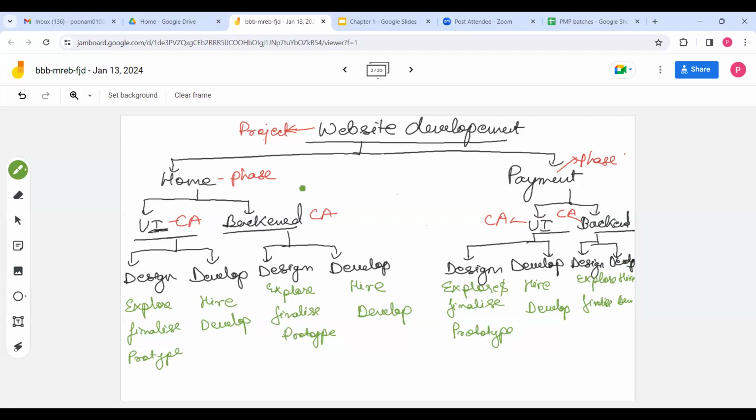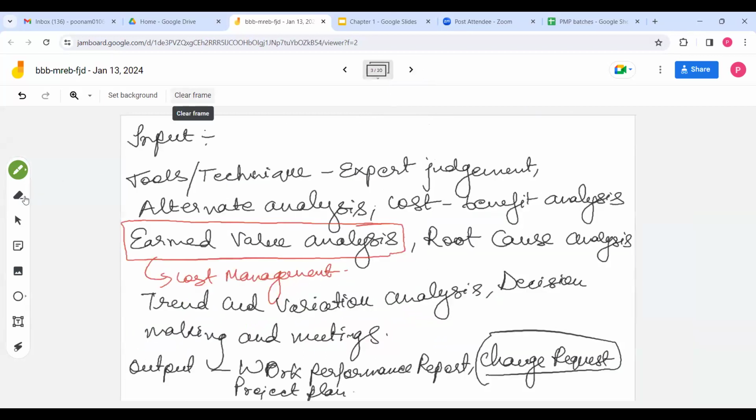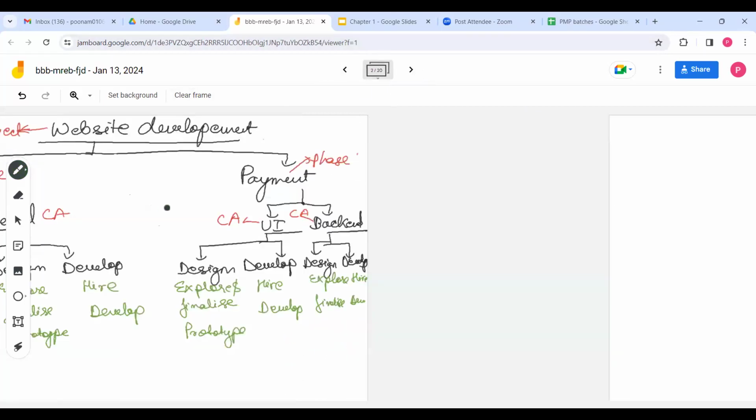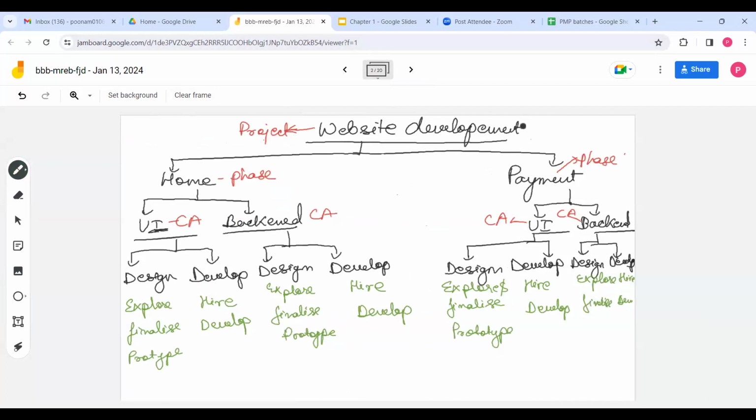Now, if someone asks you that you have to calculate the scope of all, the cost, you have to give me a budget for this, that how much this website development will cost, right? So we discussed that day that to do this, first you have to estimate the cost. In order to say what will be the budget of the website development, you will total the cost of all these activities. So for each activity, you have to calculate the cost.